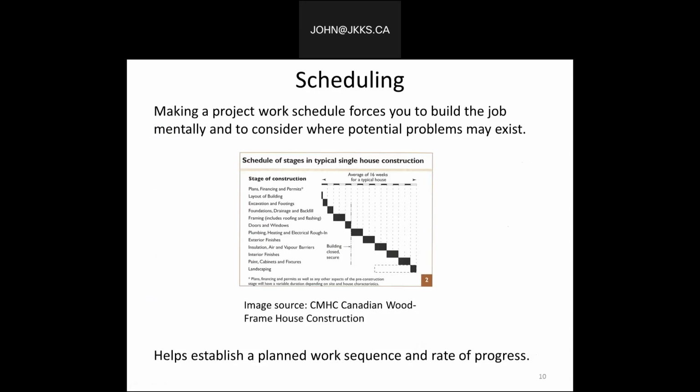To actually schedule successfully, you need to know and understand the time frames for a project from start to finish. As we can see, separation of each task determines the time and the work sequence that is actually required. There may be times when certain tasks can overlap, such as a plumbing, electrical, and heating contractor might be able to be on site at the same time. But certainly the painter should not be there the same day flooring is being installed. A good schedule helps everyone to estimate their work schedule, and hopefully everyone keeps to that schedule.